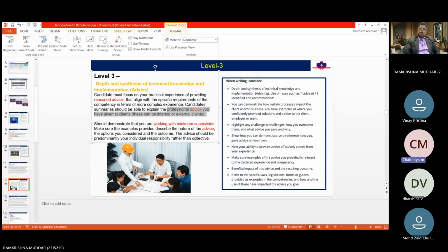It's about ready mix concrete. The prices shot up in one year, more than 25% over the bidding price. So we are not able to claim if the client or consultant rejected it. So I need to go to the supplier in order to negotiate, on the chances of giving a new project with high quantity, in order to get a lower price, or any way that we can use negotiation skills with him to reduce it. If he's charging 35 dirhams per cubic meter, we can discuss with him how much impact we can reduce with value engineering and so on. Okay, correct, got it.